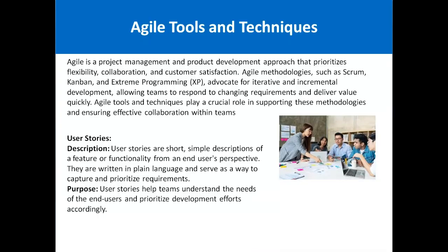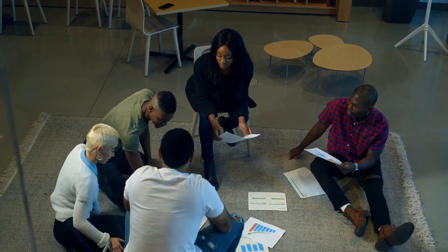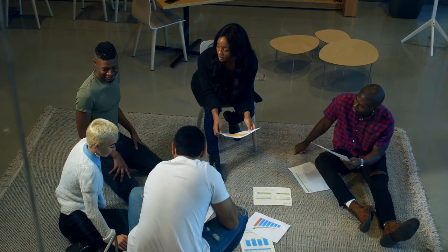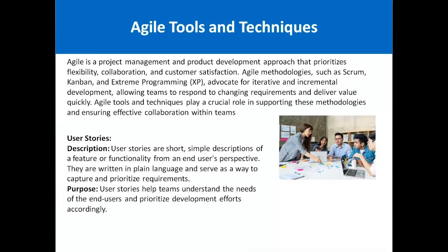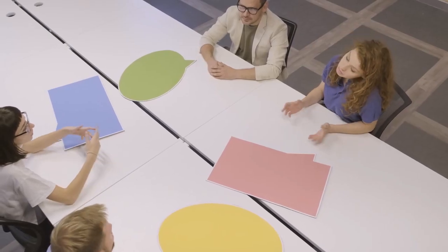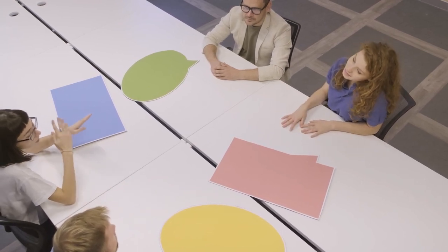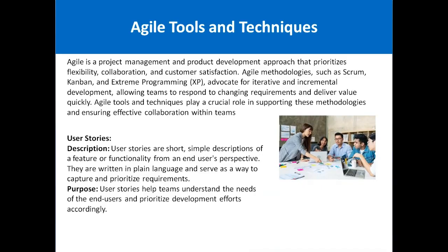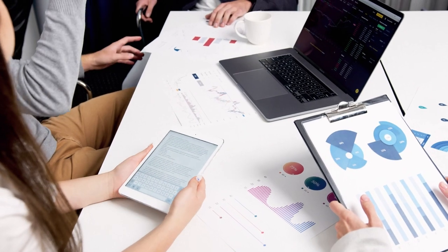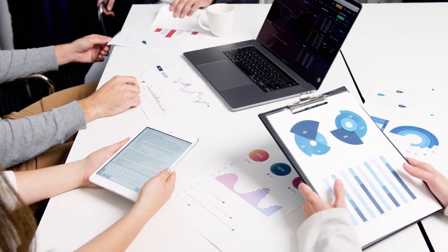That means we focus on iterative and incremental development. For example, we have 40 tasks in a project. What we can do is divide those 40 tasks into multiple chunks. We take the first 10 tasks, then do the planning, development, testing, and then take the next 10 tasks, then the next 10 tasks. In that way we divide the work into an incremental approach, an iterative approach, and based on that we deliver the work to the customer.